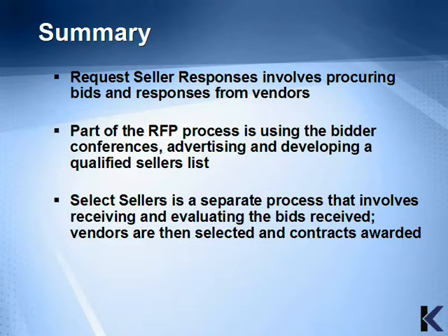Request seller responses involves procuring bids and responses from vendors. Part of the RFP process is using the bidder conferences, advertising, and developing a qualified seller list. Select Sellers is a separate process that involves receiving and evaluating the bids received. Vendors are then selected and contracts awarded.